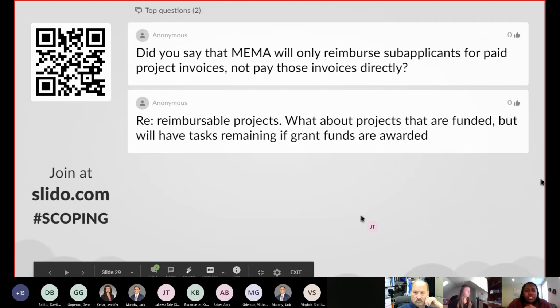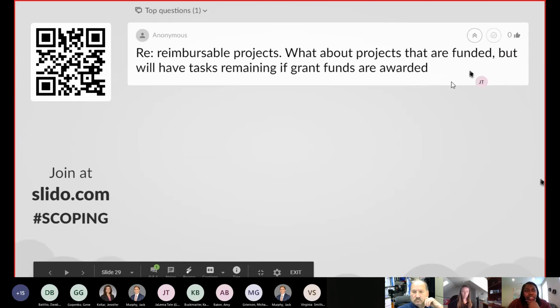All right, so did you say that MEMA will only reimburse sub-applicants for paid project invoices, not pay those invoices directly? That is 100% correct. We are looking for your paid invoice and then your proof of payment as well. So if you're doing in-kind services, that might be your payroll printout, canceled checks, different things like that. So strictly reimbursement. MEMA will not be paying any contractors directly.